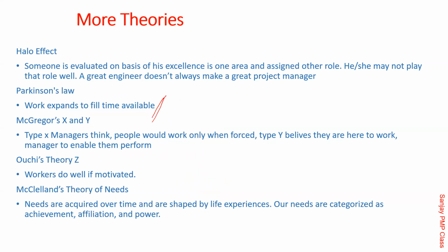The reason PMs need to know this is that when you are approving any resources, additional person, additional material, additional tools, be careful. If you think that if I sanction this, the problem will get solved, no, the requirements will increase. The moment you fulfill something, requirements increase. That's a very common thing. The requirements will always grow. It is applicable for time as well. Currently, if you are not able to do something because you have limited time, tomorrow if you get 1 additional hour, on the first day you will not understand what to do in that hour. After 15 days, you will realize it is utilized for something or the other.